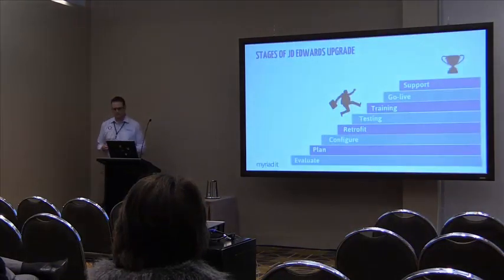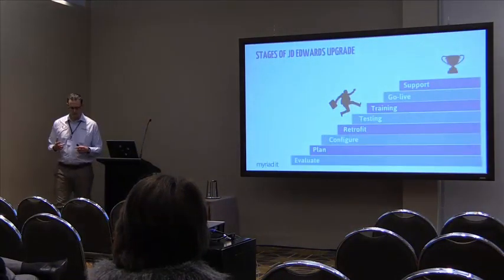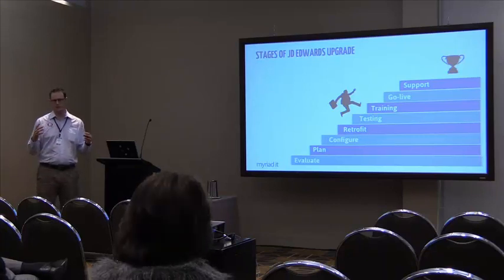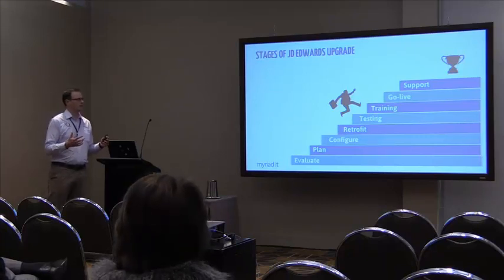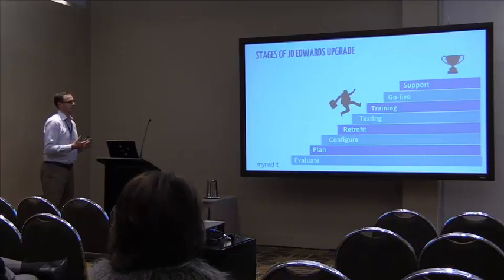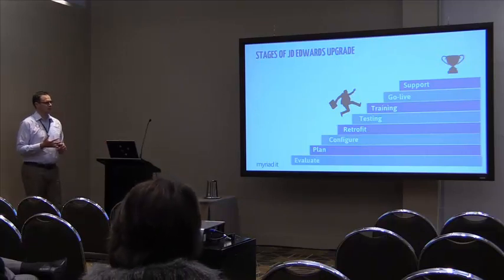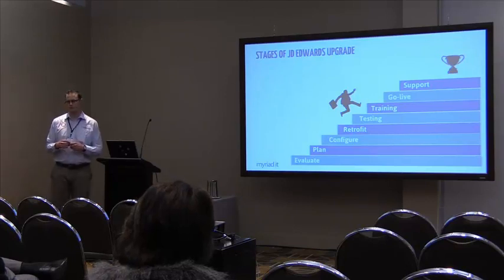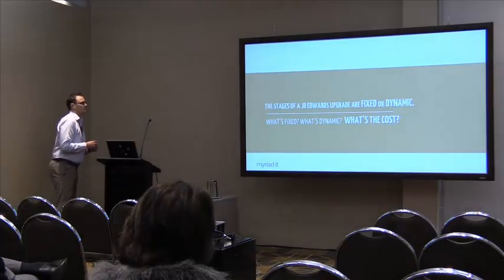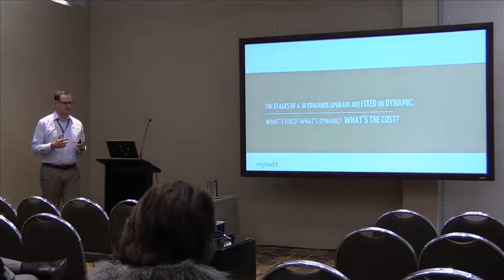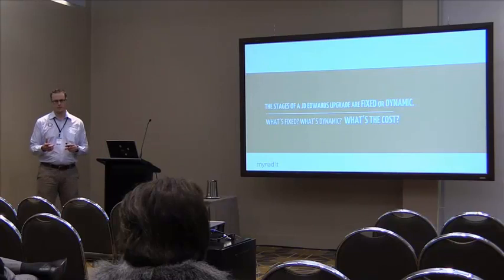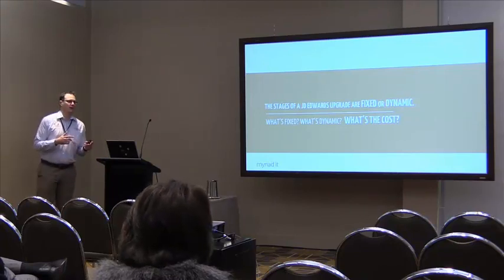Taking all of that, and thinking around the standard 100-day JD upgrade methodology, we identified 8 stages that you go through: evaluate, plan, configure, retrofit, testing, training, go live and support. These stages of the JD upgrade can either be fixed or dynamic.